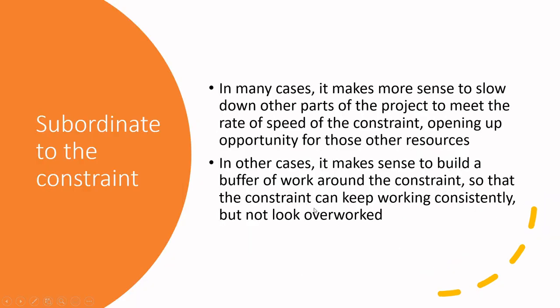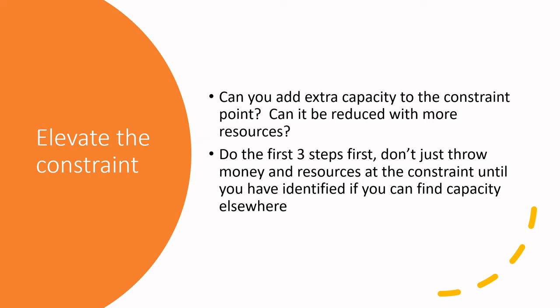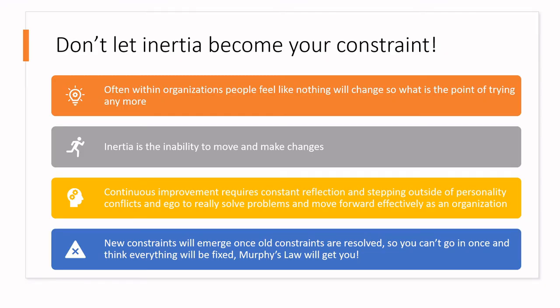Sometimes you can elevate the constraint, and that's where you're adding extra capacity — perhaps buying another machine or hiring another person to minimize the constraint. But always make sure you've done the other three steps first. Don't throw money and resources at a constraint until you've confirmed there's no capacity elsewhere. I've seen it happen where things slow down and people just start buying things, when honestly the most cost-effective solution is sometimes to slow down and wait.